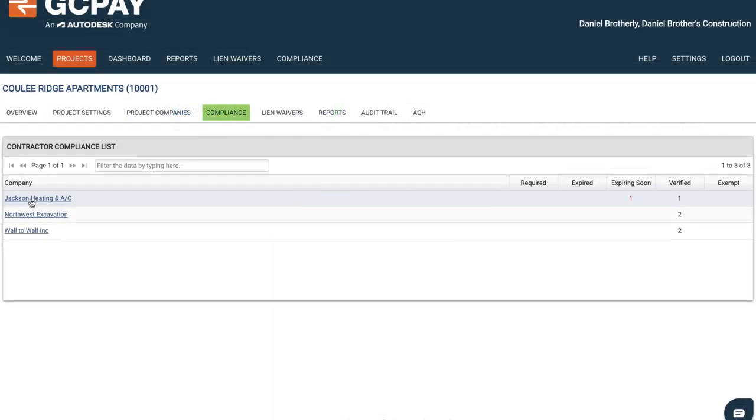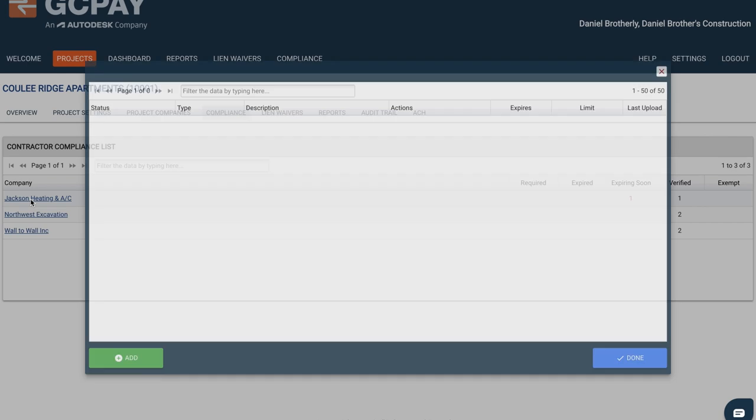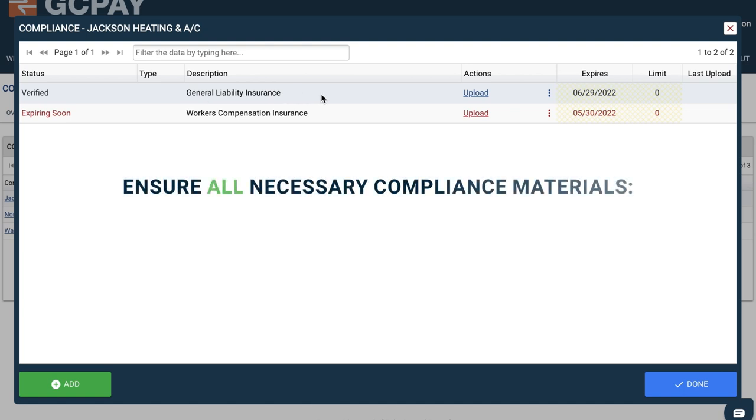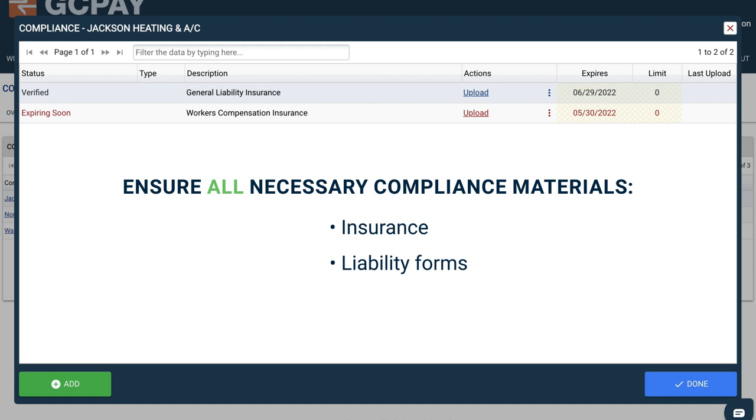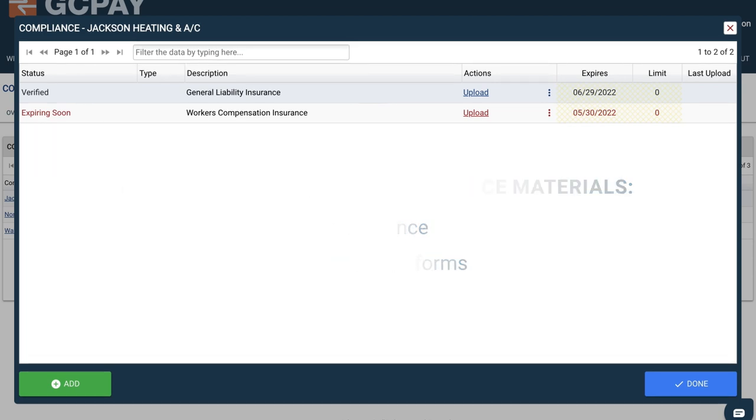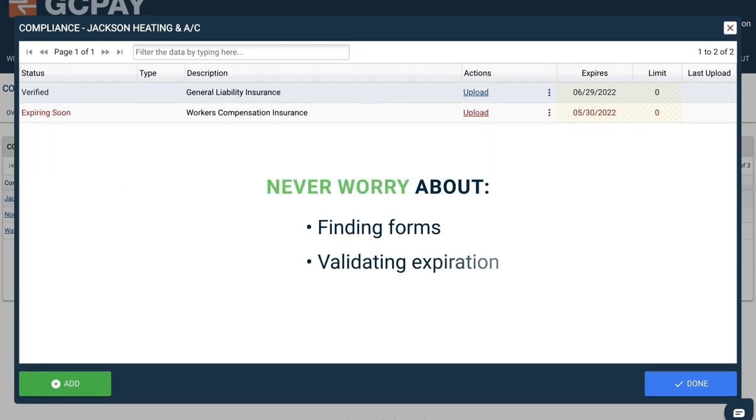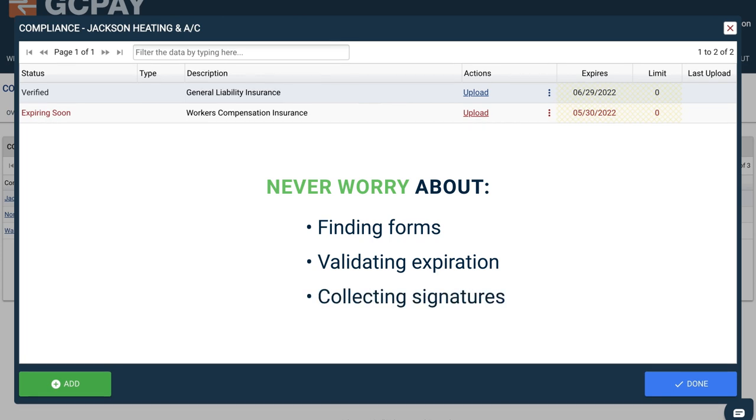GCPay's compliance features are one more way that managing subcontractors becomes easier. With every payment application on every project, you can use this feature to ensure all necessary compliance materials, such as insurance or liability forms are collected per local project regulations. Never worry about finding forms, validating expiration, or collecting signatures from subcontractors again.